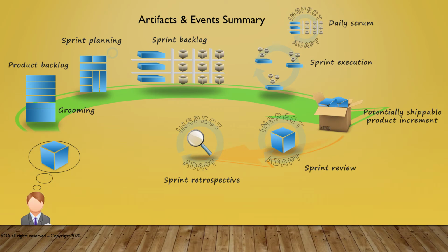It all starts when a business or an individual has an idea with plans to make it a reality. These ideas or requirements are then captured in a product backlog, which upon refinement during the sprint planning ends up in the sprint backlog. The sprint is then carried out to produce a product increment. The increment will later be demoed during the sprint review, and deployed for usage if it meets the acceptance criteria, and the process repeats itself until the project is completed.